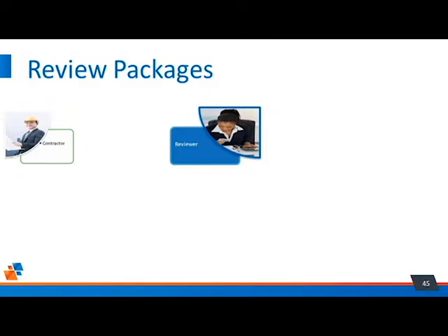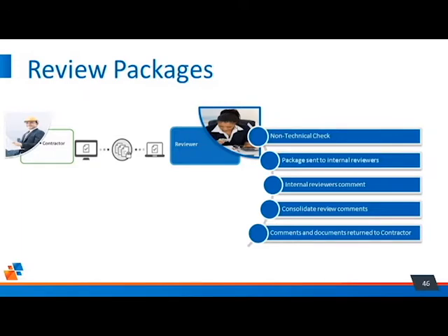So far we have seen how a transmittal gets accomplished, but another kind of contractor process I want to discuss is a review package. This can be used when a large number of incoming documents need to be reviewed by an internal team before responding to a contractor, typically an EPC on larger projects. With review packages, a series of checks or reviews occur on the document. From a document controller performing a non-technical check on the document and its data, such as making sure all documents are accounted for and all metadata has been submitted by the contractor.